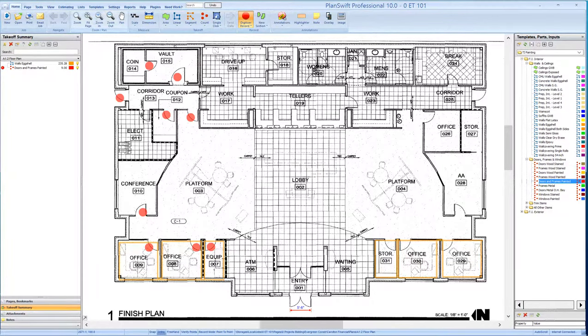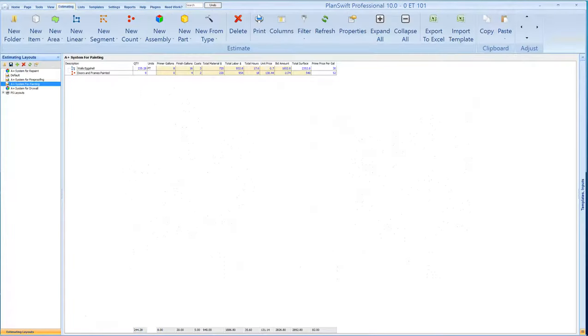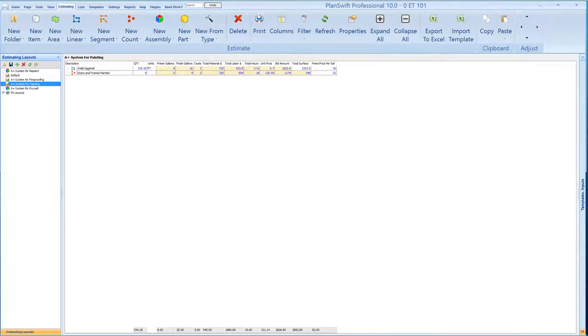Once we're done with this, we also hit on the Estimating tab, and you'll see that the breakdown it gives you, just from highlighting, automatically comes up with the primer gallons, your finished gallons, how many coats you figured for each step of the process, material dollars, your labor dollars, total hours, the unit price, the bid amount, total surface, and some other information that is used on the back end.